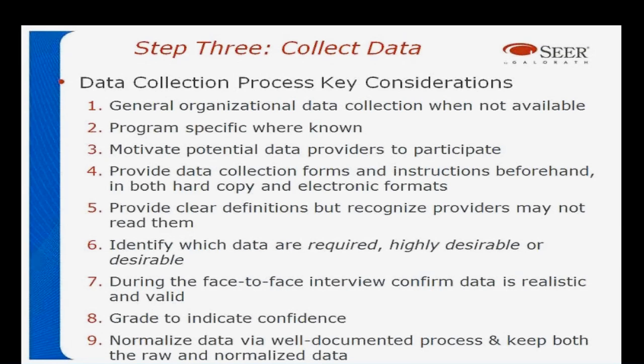Use forms when you can. And document not just what you got, but why you got it and who you got it from. Identify the range of best case, likely case, and worst case. Identify what is required or just desirable. Try to get those things that are required. Face-to-face interviews with stakeholders can be really helpful in collecting information as well.